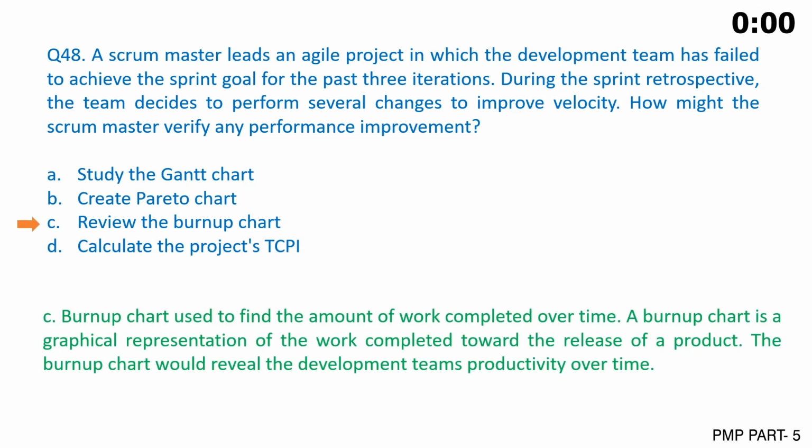The answer is C. A burn-up chart is used to find the amount of work completed over time. A burn-up chart is a graphical representation of the work completed toward the release of a product. The burn-up chart would reveal the development team's productivity over time.